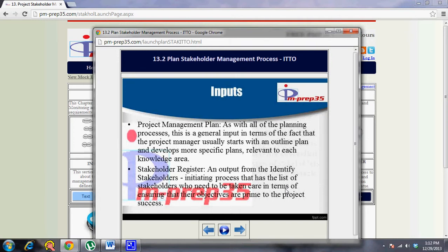So it not only puts down the stakeholder level, but also ensures that the engagement is thought over: what level it is currently in, what level it is decided to be in, how communication would be done to different stakeholders, what group of stakeholders will be involved in what phase of the project, how they will be communicated with, what the impacts would be and how those impacts will be handled. All that is part of your stakeholder management plan.